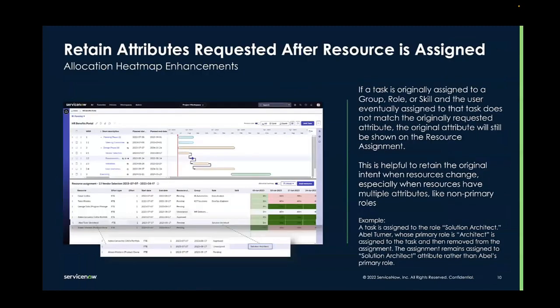Finally, the last enhancement is that now if you assign a task to an attribute — a group, role, or skill — and then assign a user to that task who doesn't match the attribute and remove them, the task will still be assigned to the originally requested attribute. The attributes of the user assigned to the task don't override the attributes originally requested.